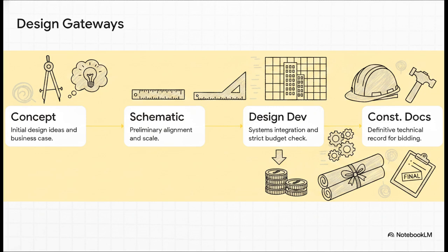But let's pause at design development in the middle. This is a massive financial safeguard. Design development is where all these complex systems are integrated, acting as a strict, hard budget check. If the estimated cost is over budget at this point, the architect has to realign the design.